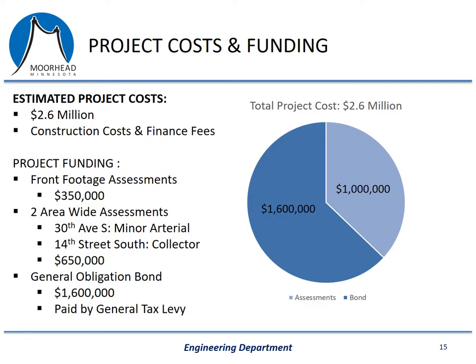When the city does projects like this, we typically get questions such as: how much does the project cost and where does the money come from? We've estimated that this project will cost approximately $2.6 million, including all construction costs as well as fees associated with financing the project. The funding comes from two sources: special assessments and general obligation bonds. Special assessments are expected to generate approximately $1 million towards the project, and the remaining $1.6 million will be funded through general obligation bonds that the city obtains on the open market, paid through the city's general tax levy fund.